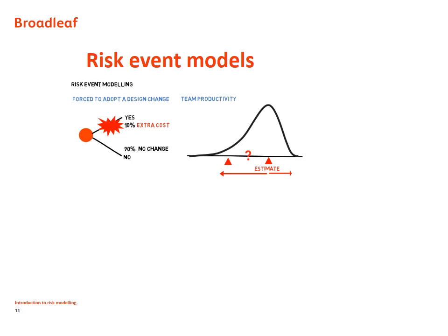The uncertainty is better described by a distribution than an event. The same goes for many of the reasons why an estimate might not turn out exactly as you've assumed. Take the cost per month of project overheads. It could be a bit lower or a bit higher than you've assumed, within a range. Neither of these cases is well represented by an event model.